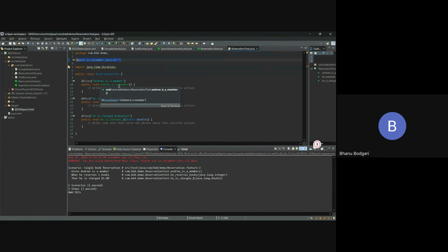At any time, and the biggest thing to me, I would make the bold statement: we are currently using the UAT phase for all the projects, right? I would say if we can do BDD in the right way, as Swastik mentioned, if we can involve users and customers at the right time and get those BDD scenarios documented continuously, then probably we don't need that UAT phase at all, because we are able to get the scenarios identified for that, and all those are getting executed here. Why do we need another phase? So just imagine what the cost savings could be if we can reach that stage.